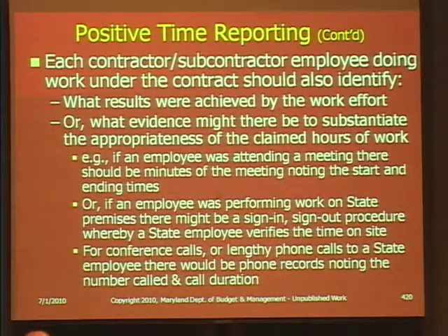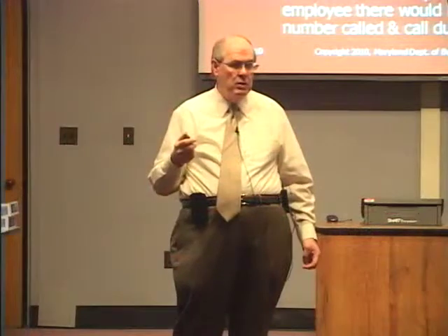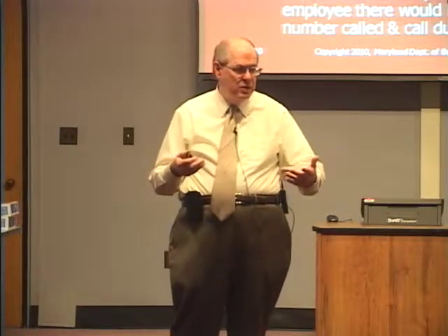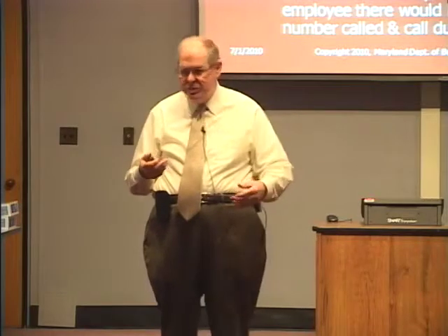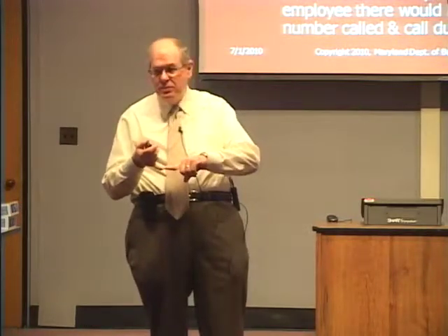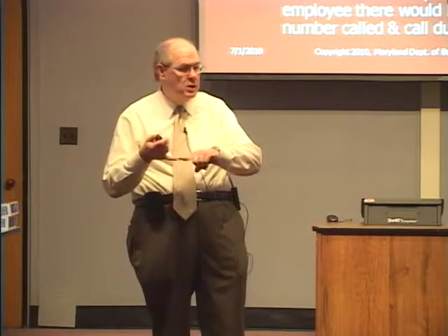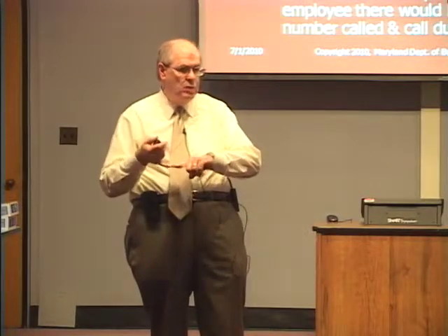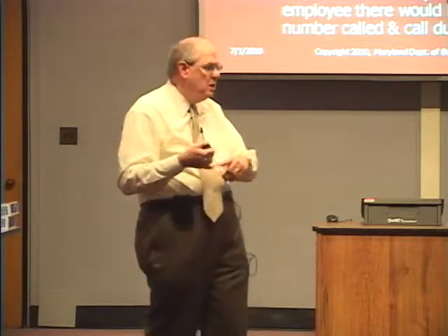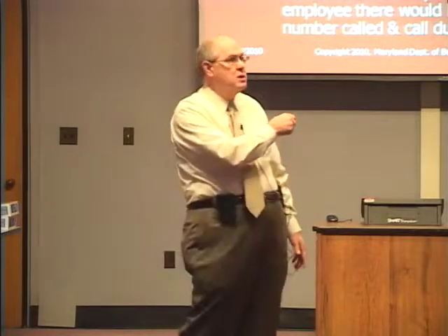For conference calls, lengthy phone calls to a state employee, there would be phone records noting the number called, the call duration. So if they're on the phone with me for half hour, I should be able to verify that I spent that duration of a call with so-and-so, especially if I did my contractor contact list that we said before, where we're noting each instance where there's a call made, the duration, the person talked to, the subject matter, etc. That's something that's available to check against.